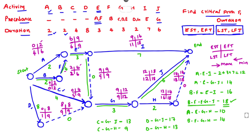We have now found EST, EFT, LST, and LFT for all activities. Notice that along the critical path B–F–E–G–J, there is no difference between EST and LST, or between EFT and LFT — meaning there is zero float. Any delay on the critical path will directly affect the total project duration. This is the method to solve a CPM problem. Thank you.